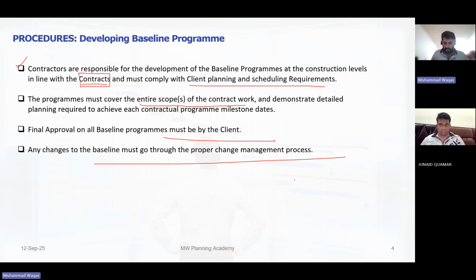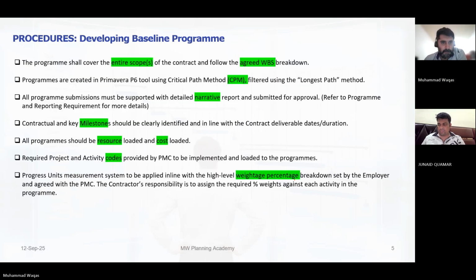Okay, once you change it, you will make it part of the validation report, because normally here we have the validation report. In the validation report, you will mention that specific item which you changed, and also you will make it part of the change log. Okay.